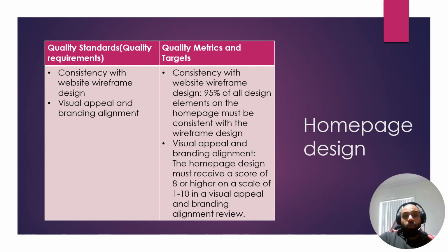Following up, quality standards and requirements. The second point would be consistency with website wireframe design. 95% of all design elements of the homepage must be consistent with the wireframe design. Visual appeal and branding alignment: the homepage design must receive a score of 8 or higher on a scale of 1 to 10 on visual appeal and branding alignment review.